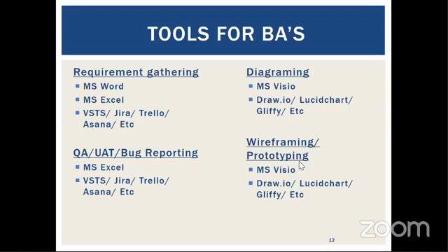In the waterfall methodology, you do all your documentation up front and you lock it in. Once your document is locked in, meaning signed off by all the stakeholders, when they sign off on a document or your requirements, you do not go back and change those requirements. The next phase happens after the requirements, then there's the design and so forth. So you don't go back and change the requirements. So those are easily written in a Word document. There's a sign-off process, and that's it. You don't touch those requirements.